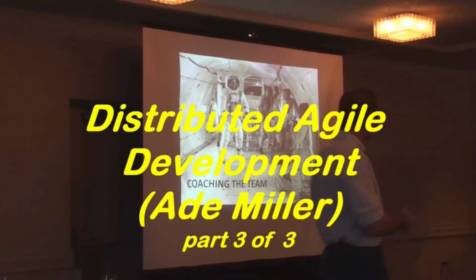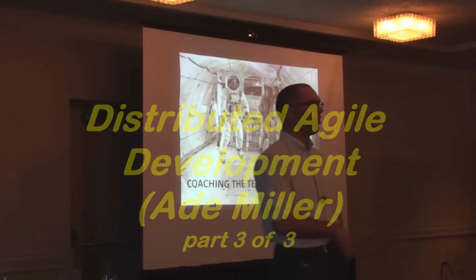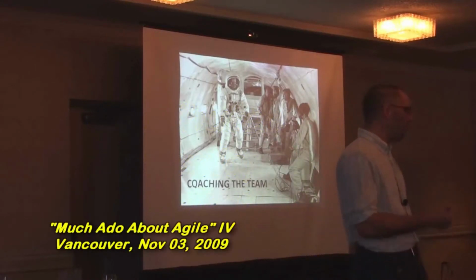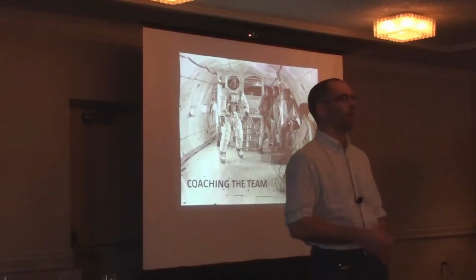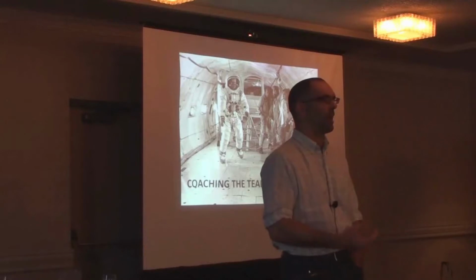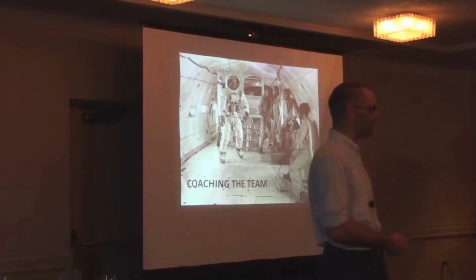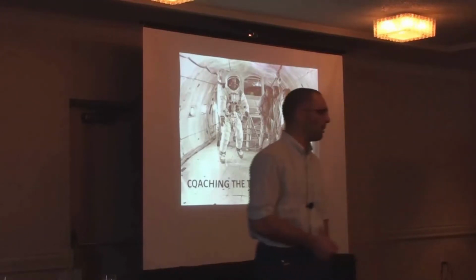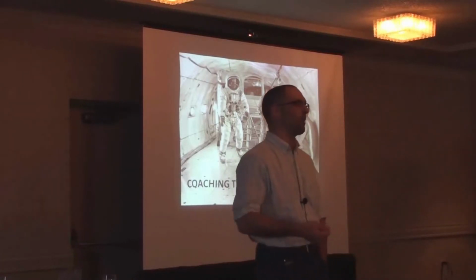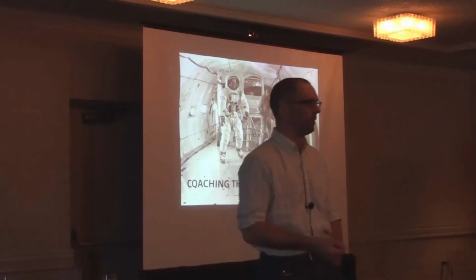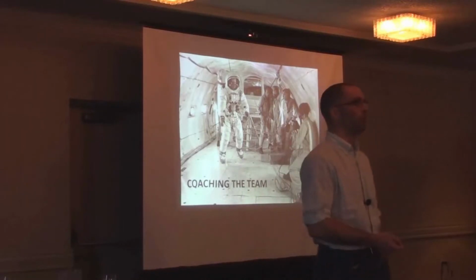We've been doing Agile for a while and we thought we'd figured it out, and then we discovered that these things were dropping by the wayside. I think largely it was because we didn't really have anyone on the hook. I couldn't walk into a team room and say, right, who's the coach? So we went back and said, look, someone is going to take this role, and that role on a distributed team is not to be the practice cop, but to remind people that there are these underlying principles, and that by skating on retrospectives, because they're hard to organise when you're distributed and on the phone, it's going to be really hard to improve.